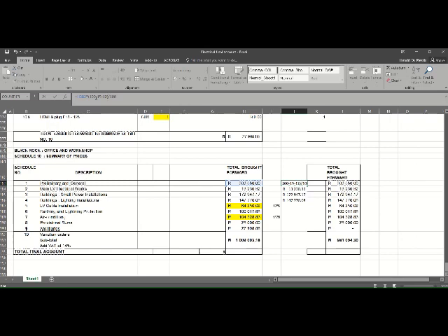Take that out. Sorry guys, I'm going through it quite quickly, but I think you can rewatch this again. Okay, so then we've got our P's and G's included there. Earthing and lighting protection. Okay, so here you just have to go through the BOQ to make sure what is actually applicable of your historical building on your new building. So what you would do is just subtract the items that are not applicable. In our case, let's say in our new building we do have lighting protection, so we've included that.